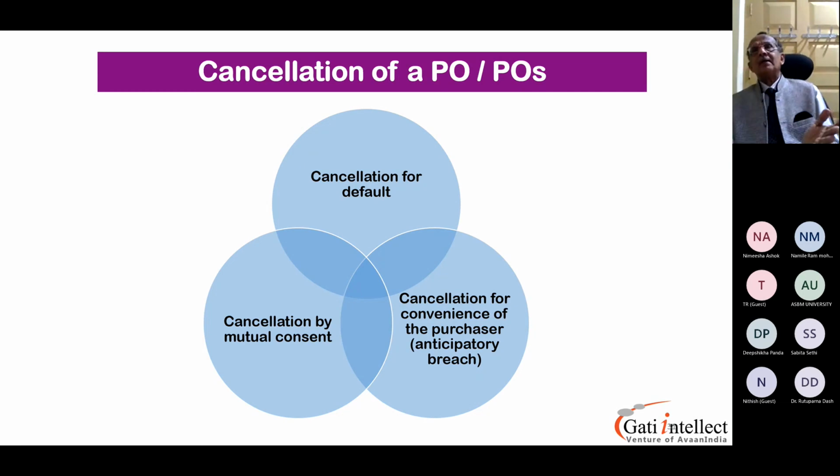Almost 1.5 years went by because the raw materials were not available. So in such cases, these are genuine issues. When it is a genuine issue, you can put it in black and white with proof, showing the exact position in the market. These are genuine issues which have to be demonstrated with sufficient proof. It is not subject to cancellation because you're informing them well in advance.